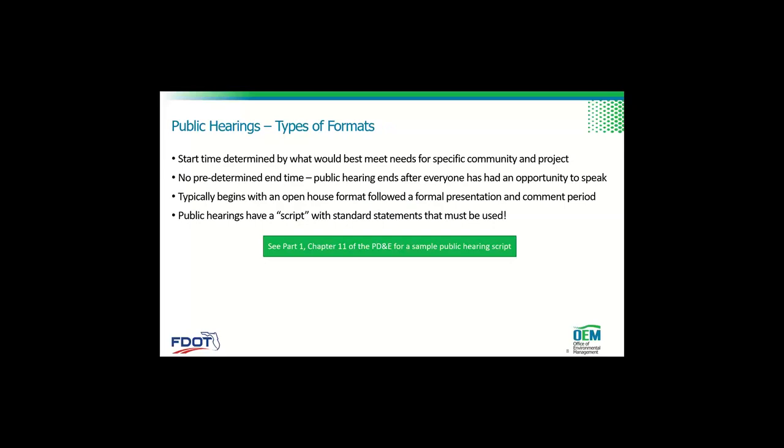So a little bit more about public hearings and the types of formats. All of the notification requirements for a meeting or a hearing are in Part 1, Chapter 11 of the PD&E manual. The start time is determined by what best meets the need for your specific project.